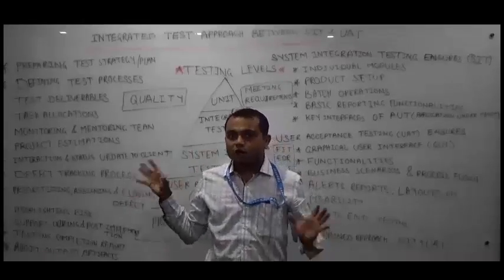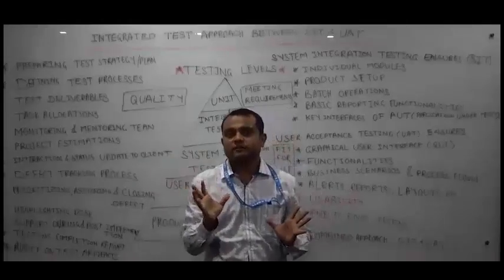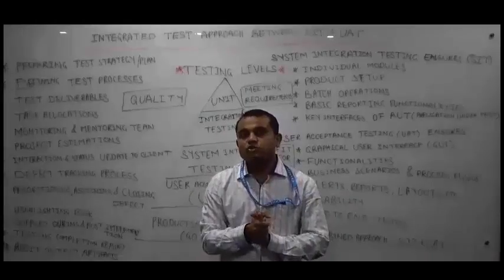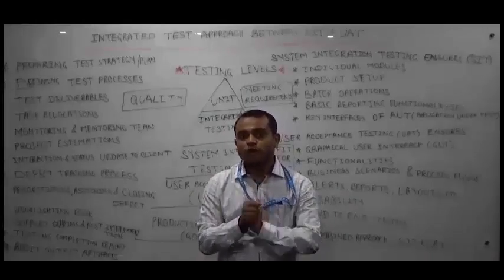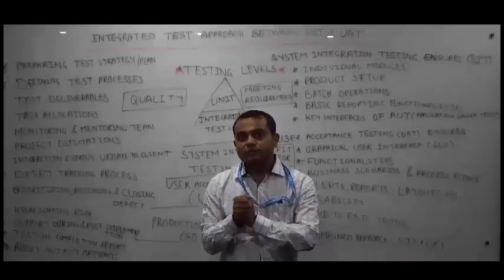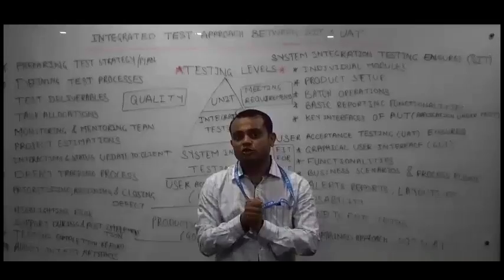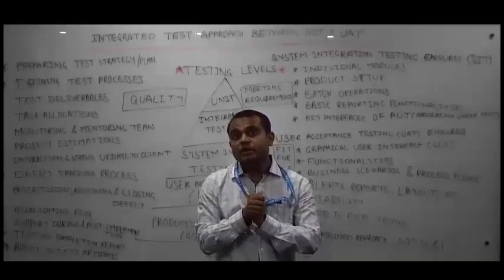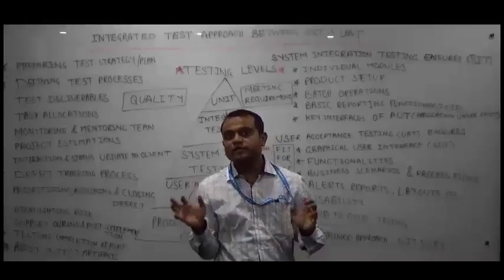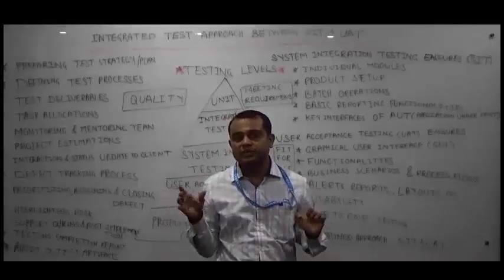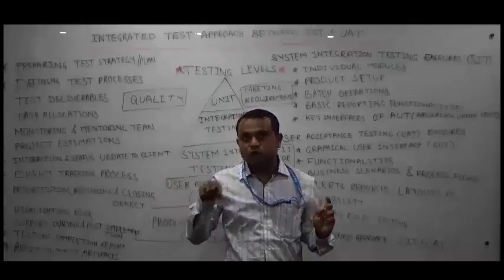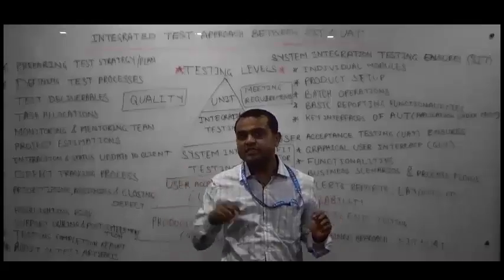So after all this explanation, you will come to know that by using the integrated test approach, we can save almost 35% efforts. Suppose a project requires $1,000, it will be completed within $650 only. In previous scenarios both teams would work hard and both teams would take the time to complete. Here there will be saving of time because both teams will perform the testing parallelly.